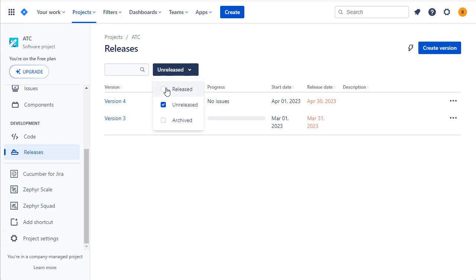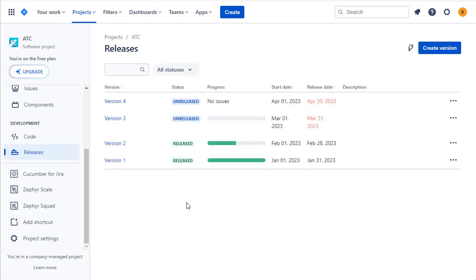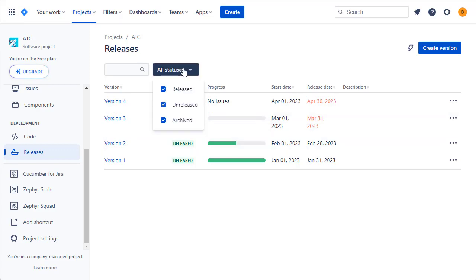Note that versions can be categorized by their release status: unreleased, meaning they've not been deployed to the customer; released, where they have been deployed to the customer; and archived, where you've decided you're no longer interested in this particular version and want to hide it from view.